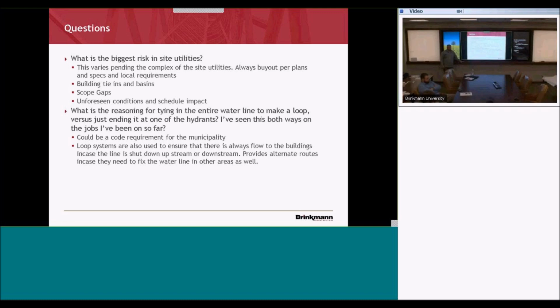Yes, I have a Pfizer. It's not from sprinklers, but if you're doing a renovation on plumbing, make sure you have the correct drawings from the previous plumber, because sometimes they change things and you don't realize it. They put a Y backwards and stuff was getting caught and clogging the plumbing.